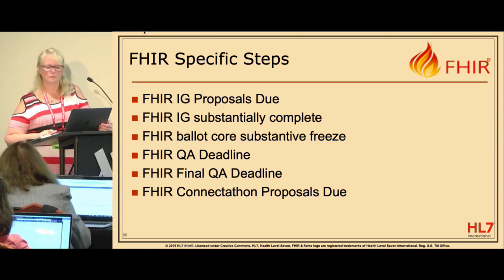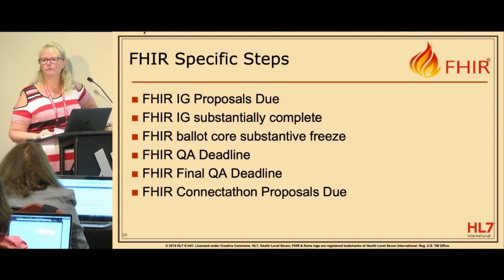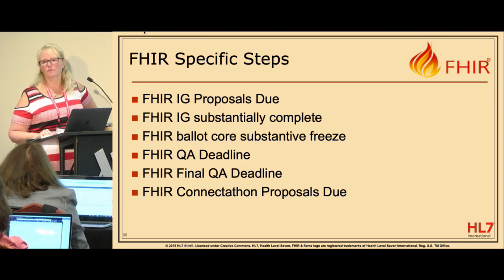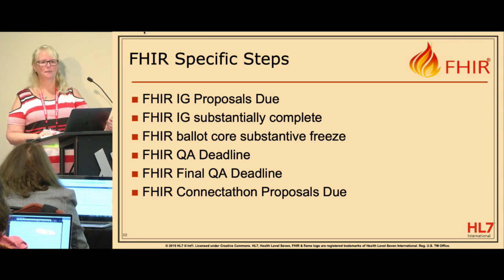Part of the PSS process is to let the organization as a whole do that prioritization. There are approvals that make sure that all of the different work groups who might care about what you're doing are aware of it and have an opportunity to have influence over what you're doing. And part of the technical steering committee's review process is: how many projects do you currently have active? How many of those are late or in trouble?